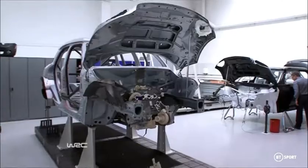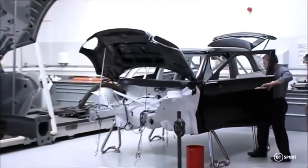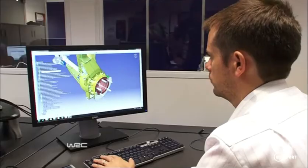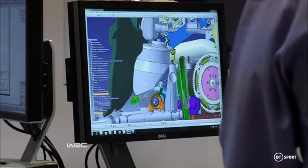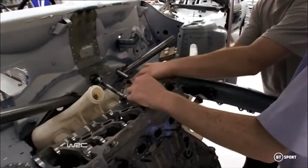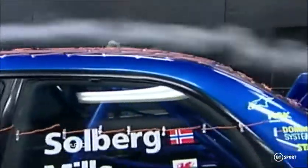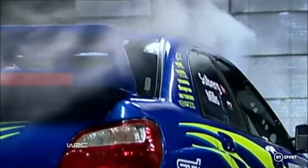We take the regulations, look at what would be the ultimate, and then apply the car to that. So I think it's broken up into probably 6-month sectors. The first is the generic design, then you're starting to do detailed application of the car to those designs. Then you're looking at another 6 months to do the detailed drawings and manufacturing of prototype parts. Gearboxes and things take sort of 16 weeks to deliver, and the engine development. And then about another 6 months for the testing program. So you're looking at this 2-year gestation period from original thought process to delivering the car.